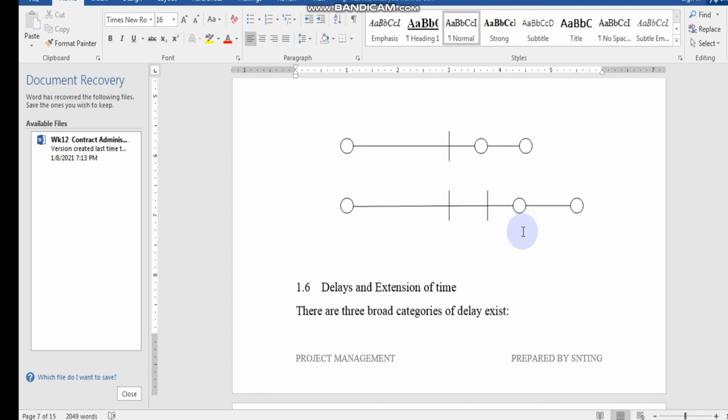So we have to be aware of both, and of course some engineers will abuse that as well. They do not want to issue practical completion. When you apply for practical completion, the client, engineer, SO and the authority need to come and visit the site, and after that they certify, okay, can practically complete. They have to issue you a proper letter on the date you actually request them to come, or the date of inspection, and they will backdate it to that date. It means a lot of things, because the ultimate payment will be made. A lot of things will happen upon practical completion.